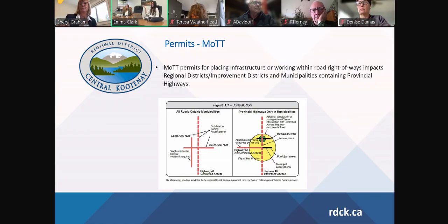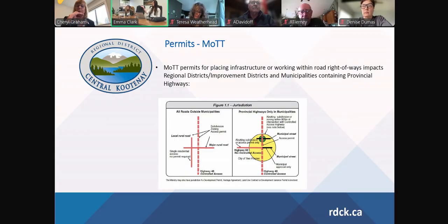I think Chris can speak to half of this. I will just say this, for the bulk of phase 1, the intent was to install them in the road right of way. So if it's on the public side, and it's near the property boundary, we would restore it to the best that we can to previous condition. And then if it's inside that property boundary, that's where we've outlined additional compensation thresholds in the consent and waiver form, and Chris can speak to that.